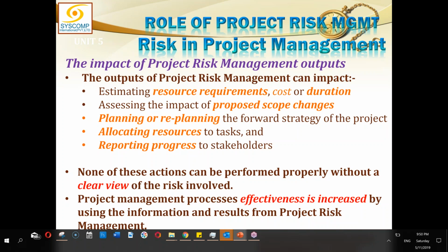This will happen, although you must be cautious about it, due to certain pressures within the project. But as soon as you realize that there has been a scope creep, you should immediately take action and move in a scope change request, so that it can be regularized. You cannot live with a scope creep. You can't just say it is okay, scope has this creep and this is just manageable. It's not manageable. It has to be brought in through scope change control.